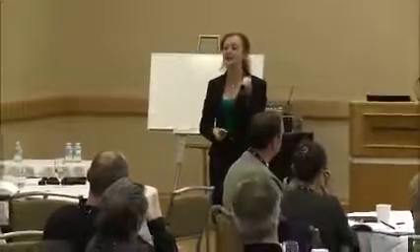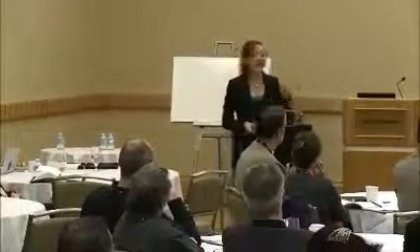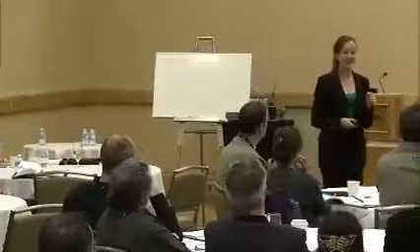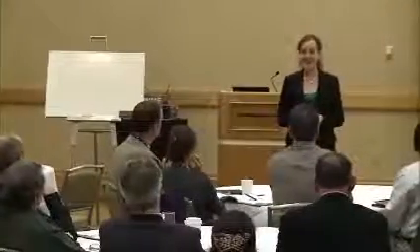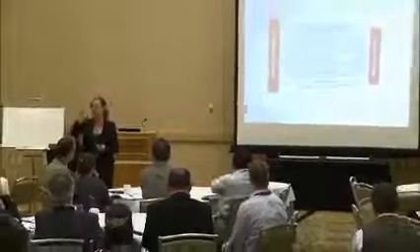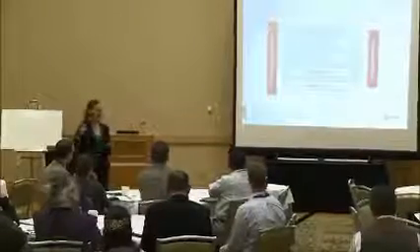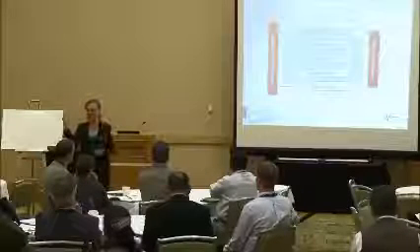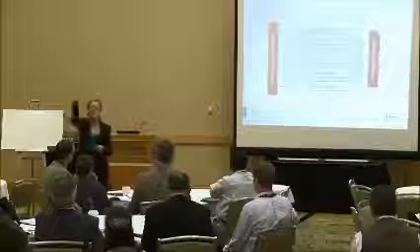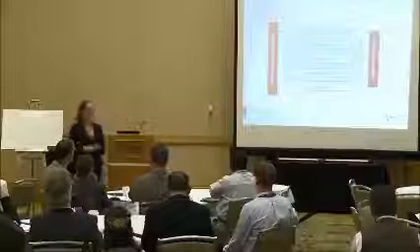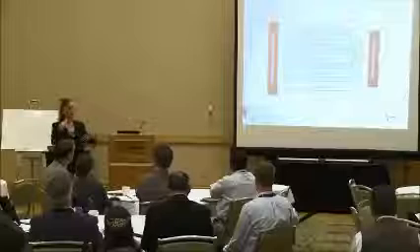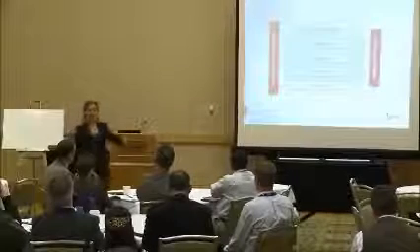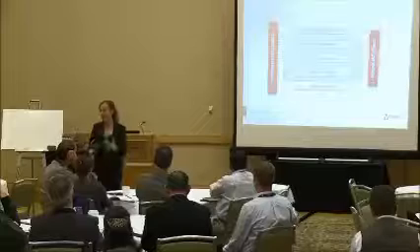So going back to this diagram, what are some of the things we can pull out of this? The first thing is the importance of establishing that context. The second thing is, can you see the arrows on this diagram? Is there a start and an end? No. Risk management is an iterative process. It keeps going around and around. Why? Risk is dynamic and it's not stagnant. As you unpack risks and put things in place, sometimes that can trigger other things, other times it can minimise them. So things actually do keep changing.